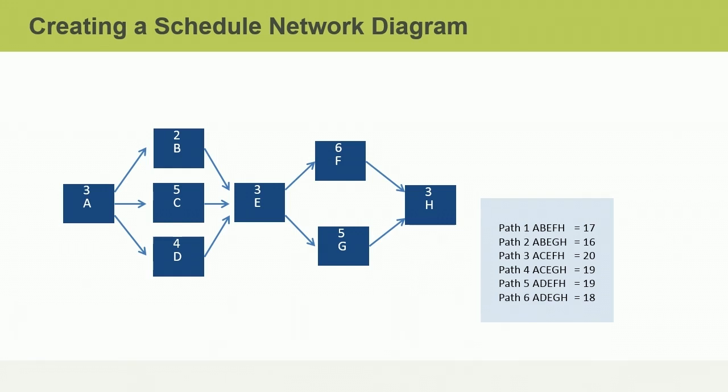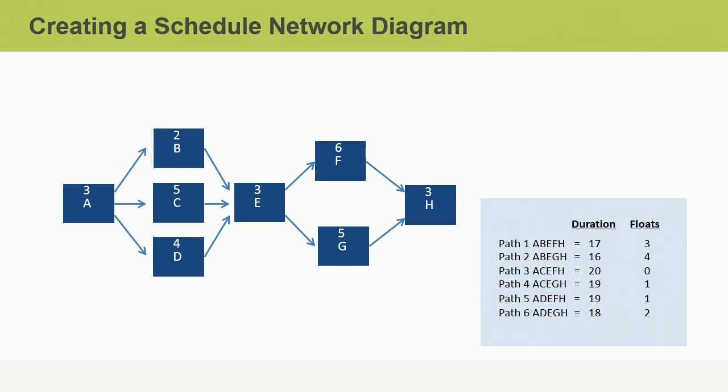There is something else you can determine by comparing the critical path duration to the durations of the other paths. Can you figure out what that is? Feel free to pause the video at any time and resume when you are ready. If you said total float, you are correct. By subtracting the duration of any path from the duration of the critical path, you can determine how much total float is available along that path.